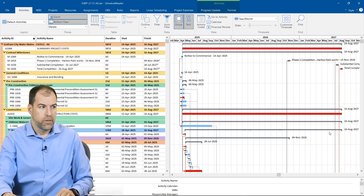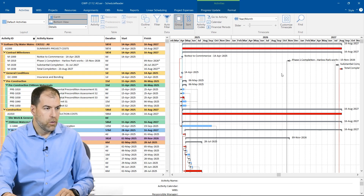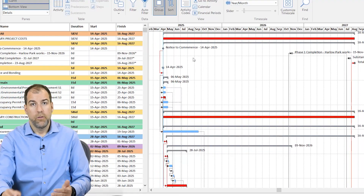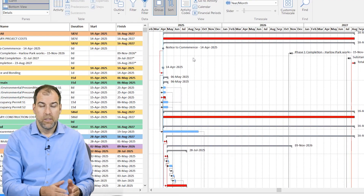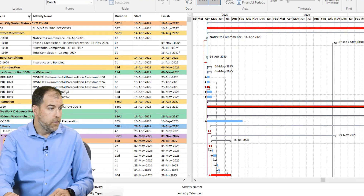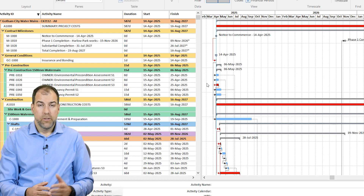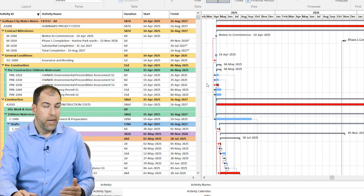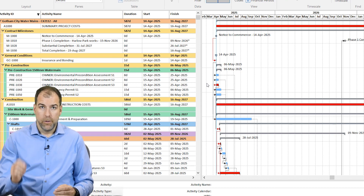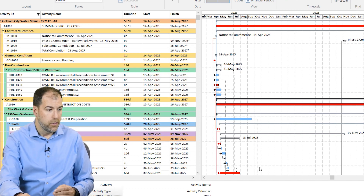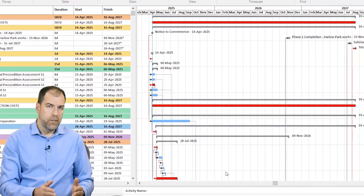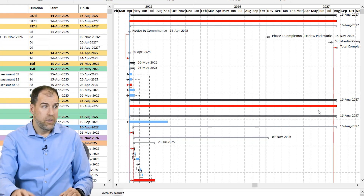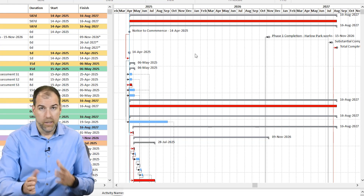There's a lot of data on this Gantt chart, but if we look a little closer we can see some of the most important things. Milestones — the little diamond shapes — are the major milestones or deadlines we're trying to hit on the project. We also have work elements, which are tasks — the basic building blocks of work that needs to be accomplished. We can define the sequence of those with arrows, which is why you see a lot of arrows on screen. Sometimes those arrows are easy to understand, but when they span large distances it can be complicated, so we can always turn them on or off to get a better understanding.